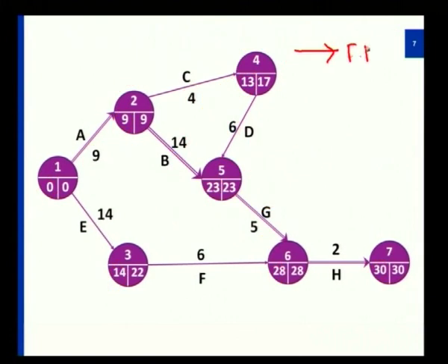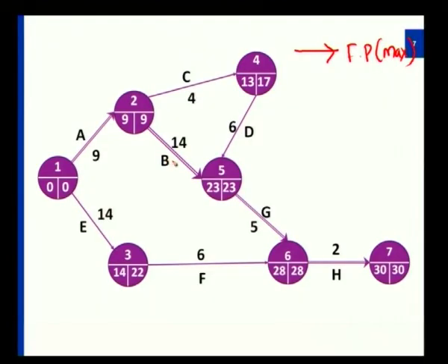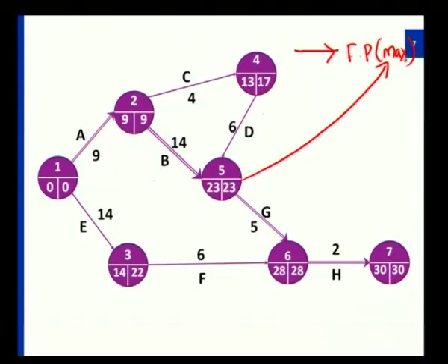So in my forward pass, still I am assuming the case maximum. So where and all I need to be comfortable or I need to be careful when I am drawing in the forward direction. Say when I am joining two different activities to a specific node, at that particular juncture I might have to fill this constraint, that is maximum. When it is a single node, I didn't have any problem, but then when two or more activities merge to a particular node, that is where this constraint need to be applied.